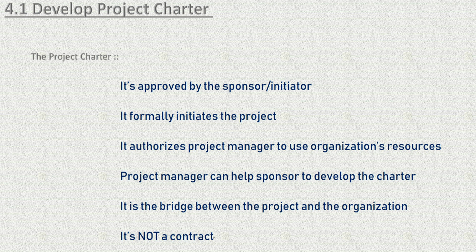Now the last point we have mentioned is that it's not a contract. That means the project charter is not a contract. Now why is the project charter not a contract? That's because the project charter is not a legal document. Okay? It doesn't bind any two parties legally. It's just an internal authorization to the project manager to go ahead with executing a project.